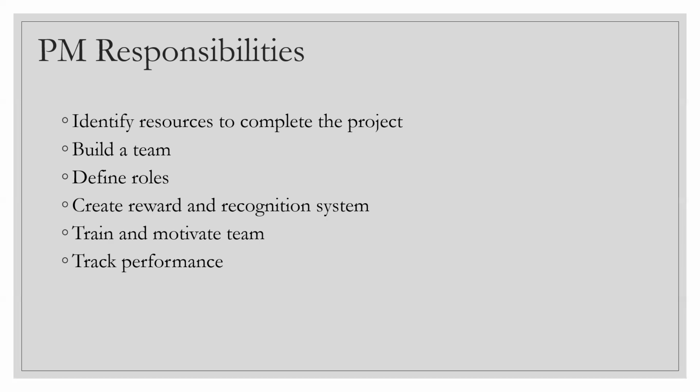From there, if this is the network diagram and this many hours of work has to be done from early start to early finish or late start to late finish, then you will know the different kinds of float you need throughout the network diagram and how many hours you need per activity to complete. Those hours can be broken down into man hours and how many resources you need to engage to complete them. It's very simple, and we have done that in detail. So the project manager's job is first to find out what skills they need and how many people they need to complete the work in the project.